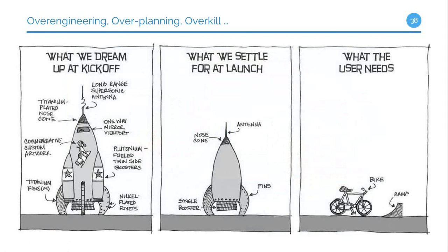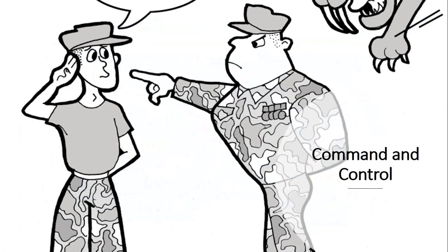If somebody tells me I have to be done in 6 months with a $3 million budget with this team, and I take on work that's unexpected, then I have to remove something, or I have to have a clear process that allows me to get an approval from someone who owns the budget, a product owner or business stakeholder, and a lot of times a technology leader, to say, this is the overage we're going to have. This is the actual deviance, or drift, that we're going to have, and of course making sure that we get all of that typically in writing.